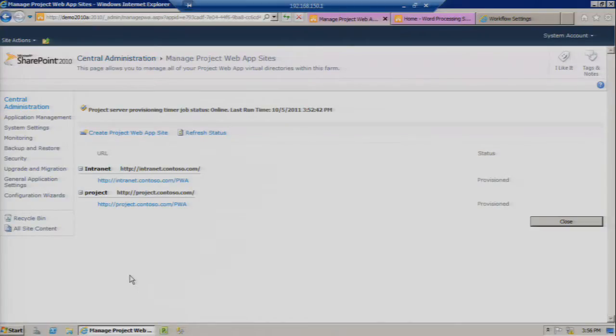So it really depends how far you want the coupling. Does the executive just want to see if you have enough capacity, or does the executive want to say, not just am I under or over capacity, but I want to start making decisions on reallocating resources? Then if you have different instances, it's not automatic. If you're in a single instance, you can do that. So hopefully that's a long answer to very good questions. And again, because we've heard it, we'll come up with a white paper. But it really depends at what level of granularity you want to manage resources within the department.